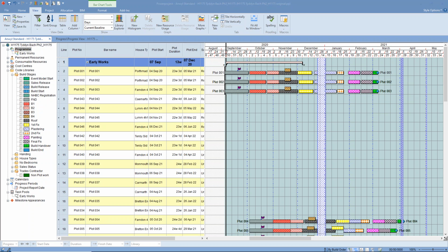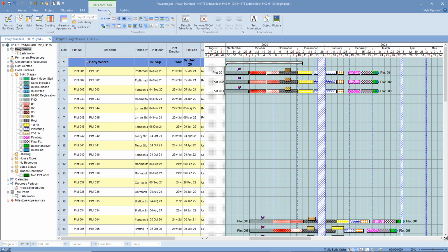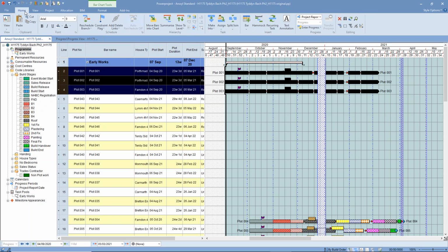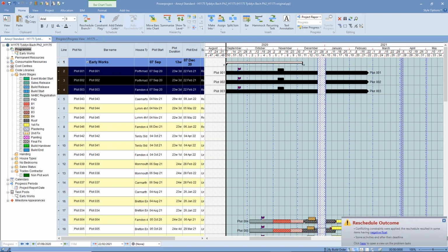So now we want to talk about the important things of editing dates. So you can see that we've got, and I've turned it off now, but I'll turn it back on again, we've got the logic links. So that gives us the opportunity of manipulating these tasks using the logic. And so again, as you probably saw on the training course, I can select a row and I can just reschedule that selection, and it's going to use the rules just on those rows.